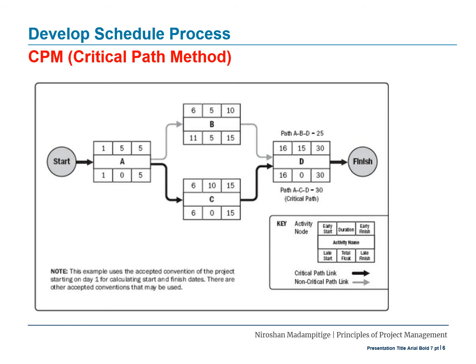Negative total float is caused when a constraint on the late date is violated by duration and the logic. Negative float analysis is a technique that helps to find possible accelerated ways of bringing a delayed schedule back on track.